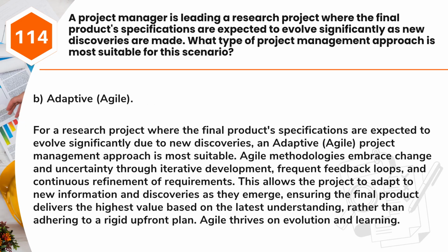Answer: B. Adaptive, agile. For a research project where the final product specifications are expected to evolve significantly due to new discoveries, an adaptive, agile project management approach is most suitable. Agile methodologies embrace change and uncertainty through iterative development, frequent feedback loops, and continuous refinement of requirements. This allows the project to adapt to new information and discoveries as they emerge, ensuring the final product delivers the highest value based on the latest understanding, rather than adhering to a rigid upfront plan. Agile thrives on evolution and learning.